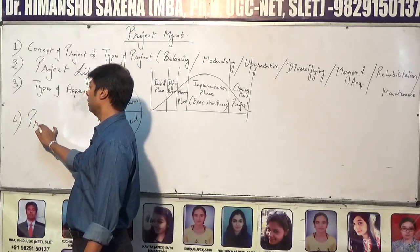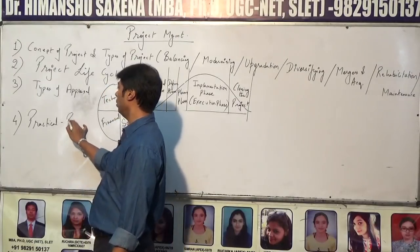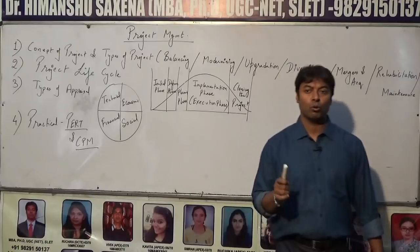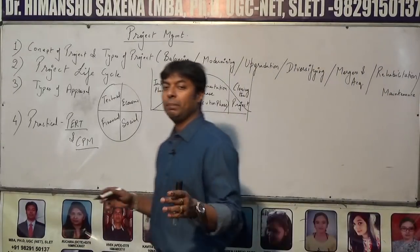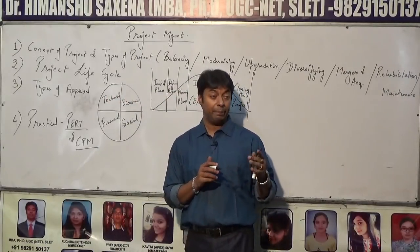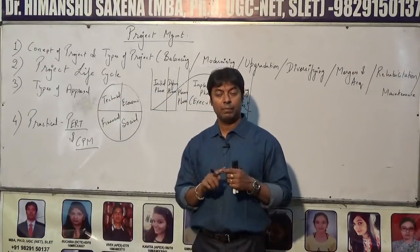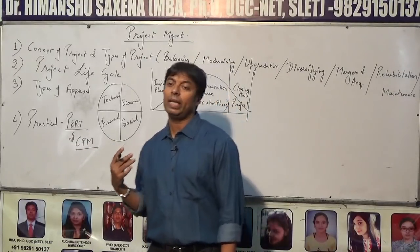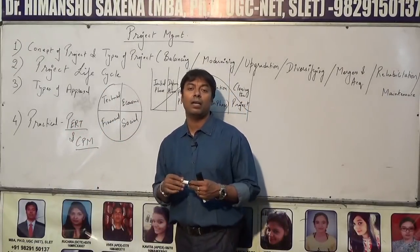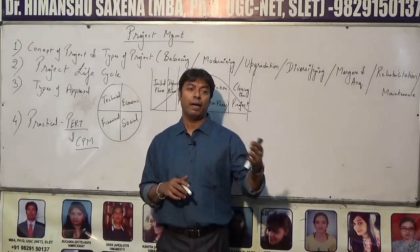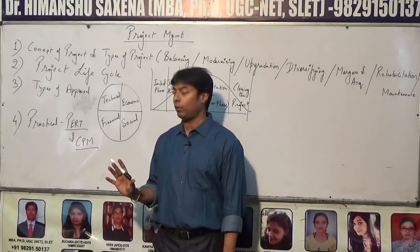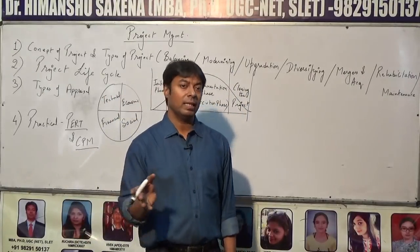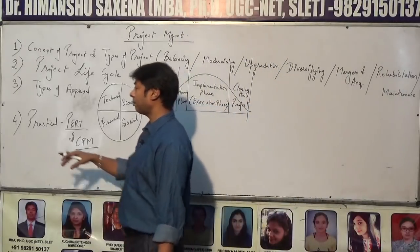Next is an important topic — PERT and CPM. PERT stands for Program Evaluation and Review Technique, where you find out the probability of completing the project within a specific timeframe based on three time estimates: pessimistic time, optimistic time, and most likely time. CPM — Critical Path Method — is based on just one time estimate, where you calculate the earliest start, latest finish, and slack of each event to find the critical path, the backbone of the whole project. You can also do practicals on crashing, which is an indispensable part of PERT and CPM.